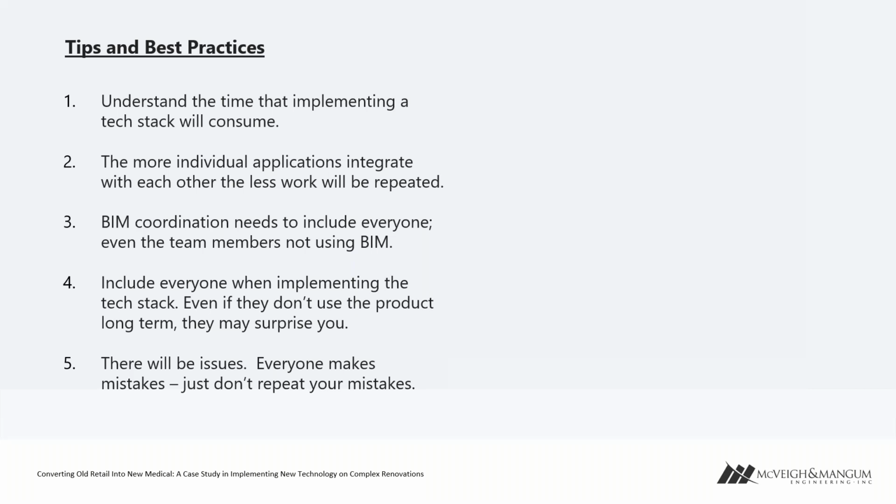The second one is the more individual applications you integrate that don't integrate with each other, the more work you're going to have. So obviously Verity and BIMTrack work together. But if you are working with 6 different platforms and you have to publish to each one of them, and gather the data out of each one and bring it back into BIM 360, that is just another set of workflows that you have to create, watch, and manage.